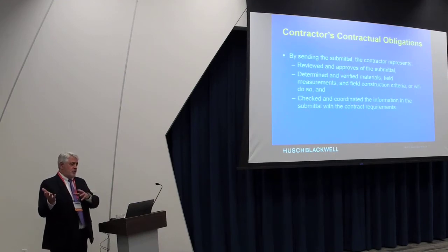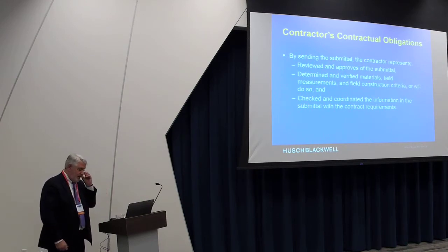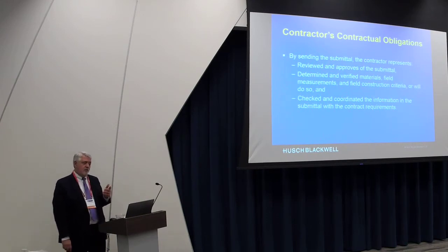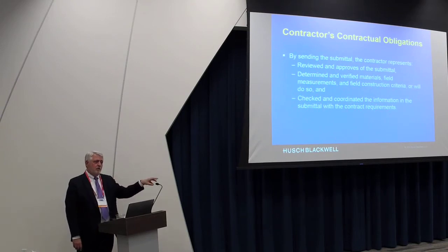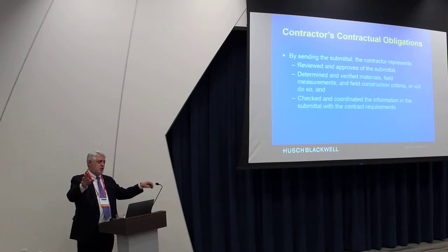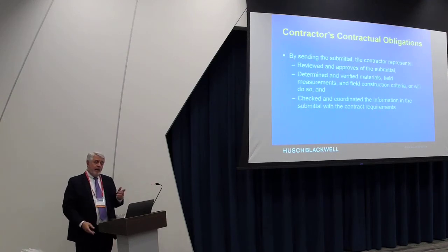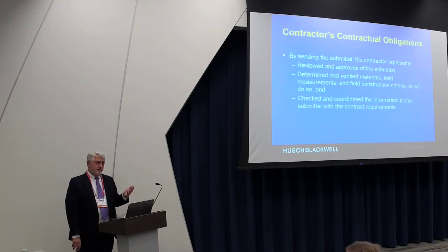The sub did all this work, and they said, well, you owe me extra money because I did more work than shown on the contract. And the contractor goes, oh no. No, you live and die by the contract. The shop drawings essentially aren't going to get you extra dollars. And in that case, the Court of Appeals in Missouri said, you got several sets of these drawings. You looked at them. You approved them and sent them on. You got to pay this guy for doing that work.